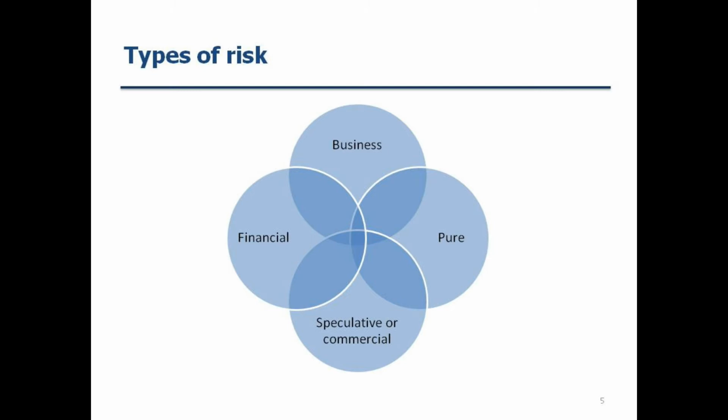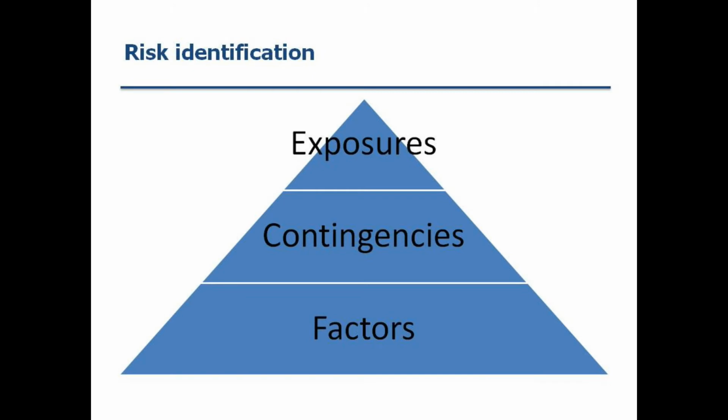The method of approaching risk management is basically the same in all the types of risk, involving risk identification, analysis and assessment, evaluating the loss options, and evaluating the finance options as well. Exposure is one side of the problem, but risk identification is really paramount.